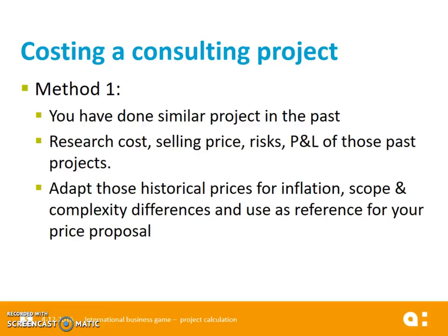When is this done? Well, for example, if your consulting activity is to come up with a business plan, you might have delivered this service already tens of times to other customers. So you know exactly how much effort setting up a business plan is. You are experienced in it. And then it certainly makes sense to look at the typical fees you were asking in the past for this.